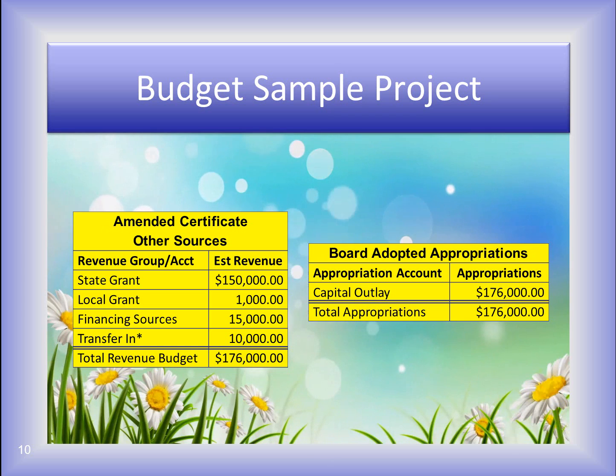Purchase orders will separate the cost by vendor, and it will be smarter and easier to track your pay requests and distributions of different sources of funding in your filing cabinet than in your appropriations. Once the project is incorporated into both portions of the budget, you will issue purchase orders to each vendor as contracts are signed. Before moving forward with the project, the governing board and fiscal officer have to understand the cash flow of the sources of revenue.